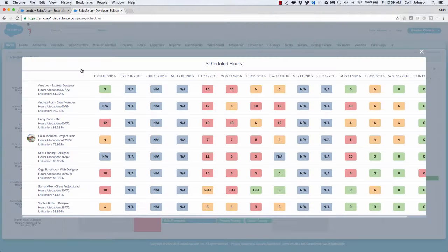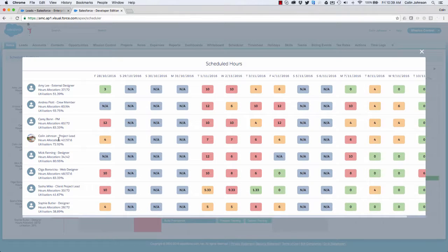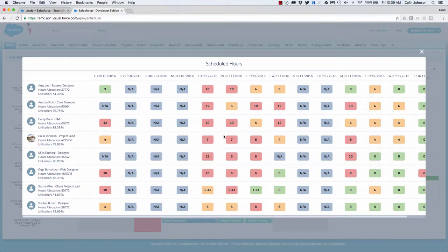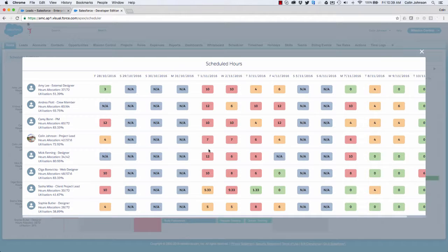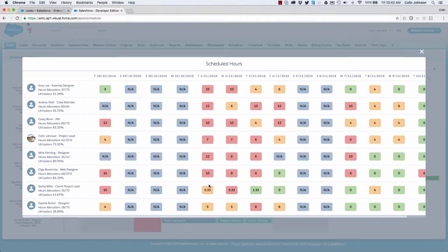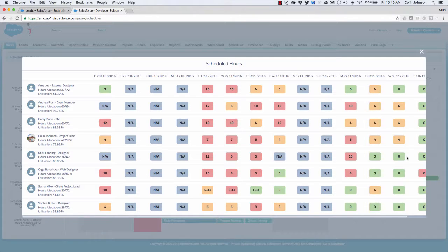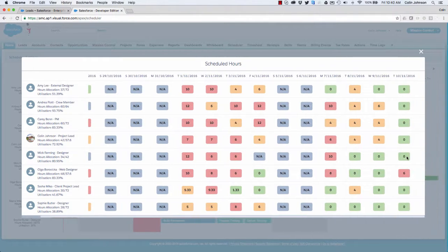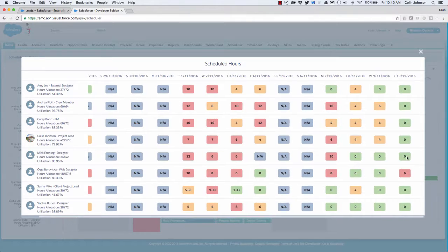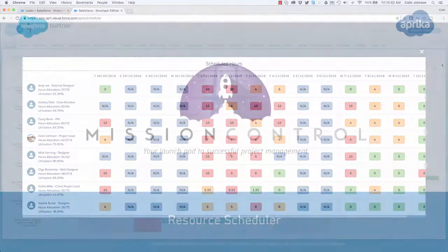So this shows me the distribution of the hours allocated across each resource over the time period we're looking at. So I can quickly see at a glance looking at the color-coding whether someone is over-allocated on a particular day. So what I can see here is Mix is actually over-allocated for the Tuesday, so we could look to either reassign this to other people or we could look to see if we could reschedule some of this work to a later point where he does have more availability.